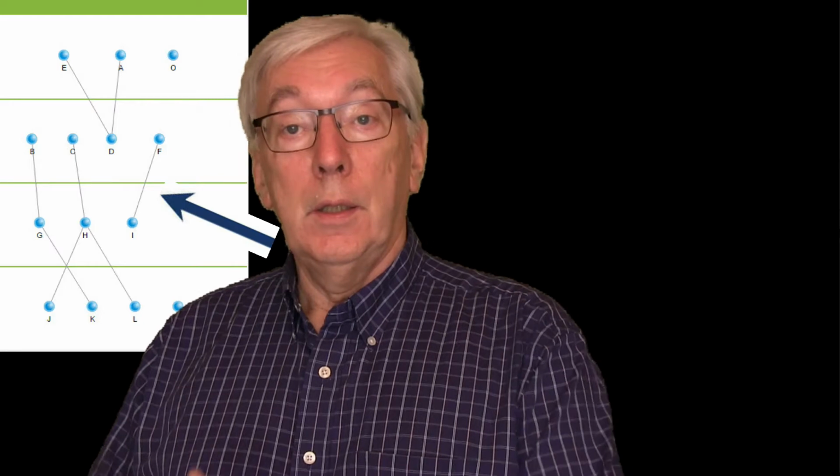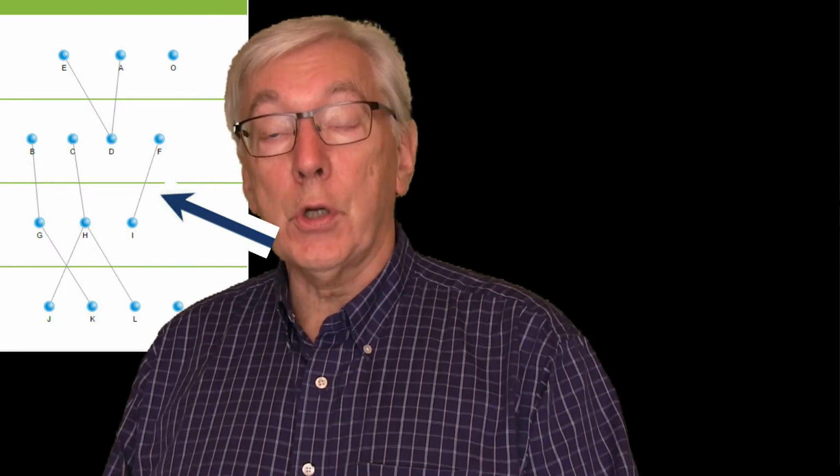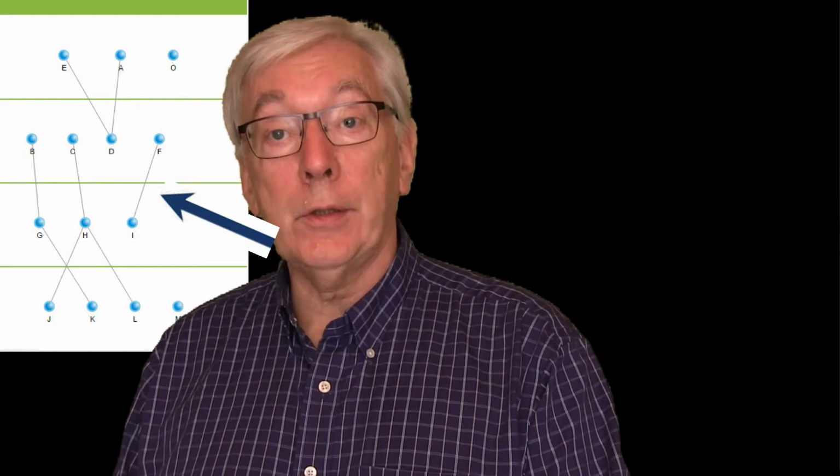It frequently will show you that you may have top level requirements that are not reflected in any deliverable. You have branches that stop halfway through the structure. You may have deliverables at the lowest level that are not reflected upwards. Maybe there is no reason for them to be there. So you get an overall picture of the whole structure of your project.